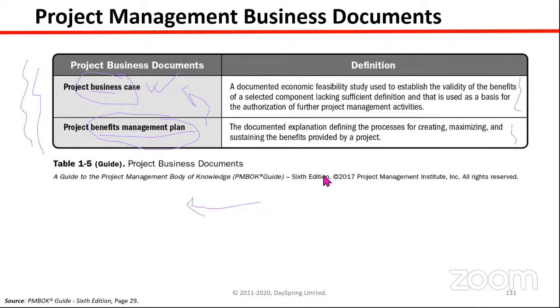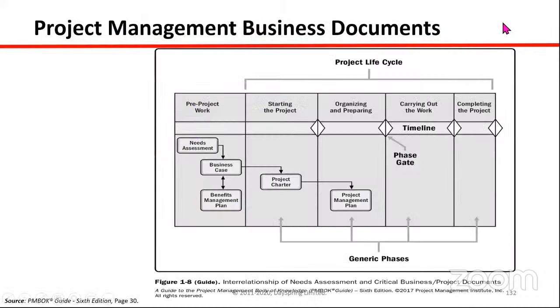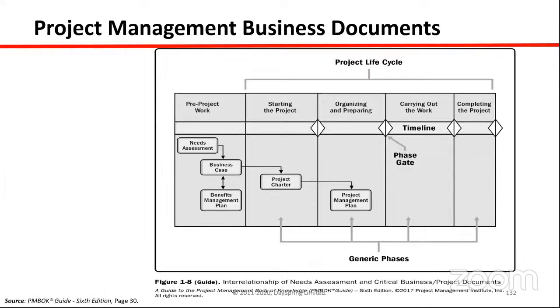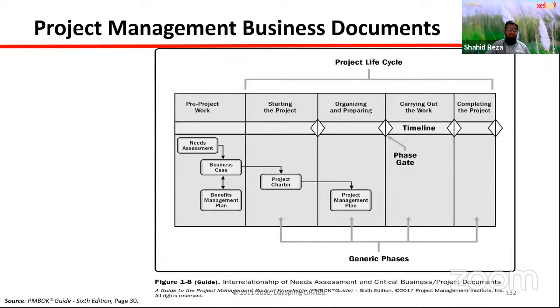Can I have a question? Yes, please. Who will be responsible or accountable for preparing this document? The project management team or management? The project management team is not yet there. So it is the responsibility, maybe, of the higher management. Yes, you're right. Please remember, the business case and benefits management plan are not the responsibility of the project team, because the project team is not created at that time. It is the responsibility of the business itself, or the management itself.